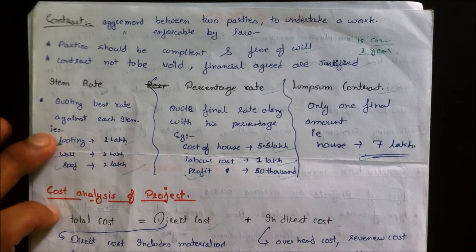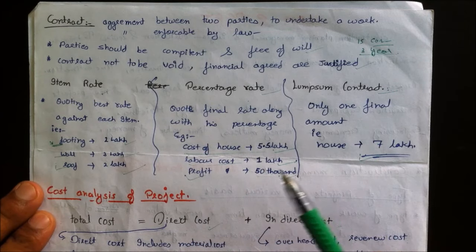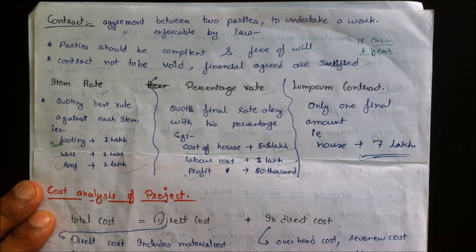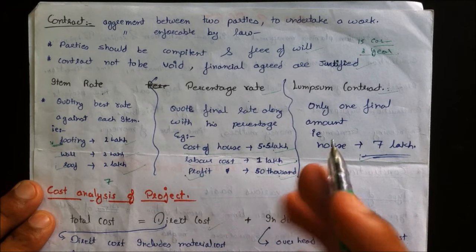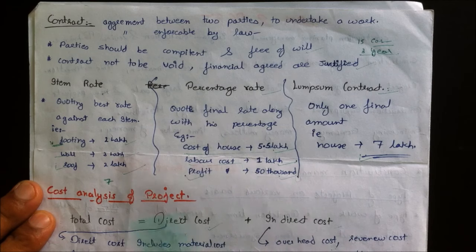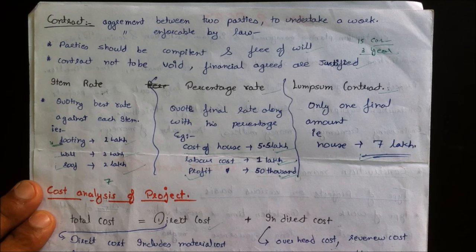Contract types include item rate contract, percentage rate contract, and lump sum contract. In an item rate contract, drawings are available and rates are quoted per item. In a percentage rate contract, the engineer quotes the cost breakdown — for example, house cost 5.5 lakh, labor 1 lakh, and profit 50,000. In a lump sum contract, used by senior contractors, the total value is fixed — for example, building a house for 7 lakhs directly.